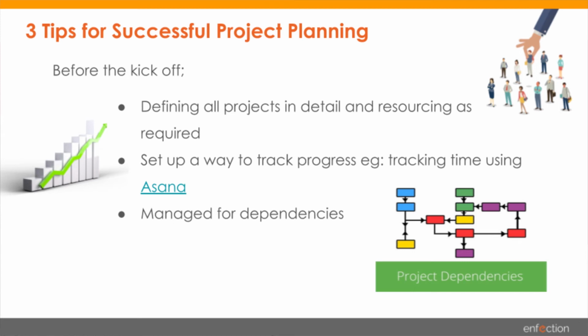The same example I can take here as well. If you look at this diagram, you can see that this red box is dependent on this blue box, and this blue box is dependent on this blue one. Just like this, let's take a simple web design, web development project. The AM will get the requirement from the client, and then brief it to the designers. So designers are dependent on whom? The AM. So there is always a dependency. Then when the designers come up with the design, it goes to the web developers. So the developers' work is dependent on the designers' work.